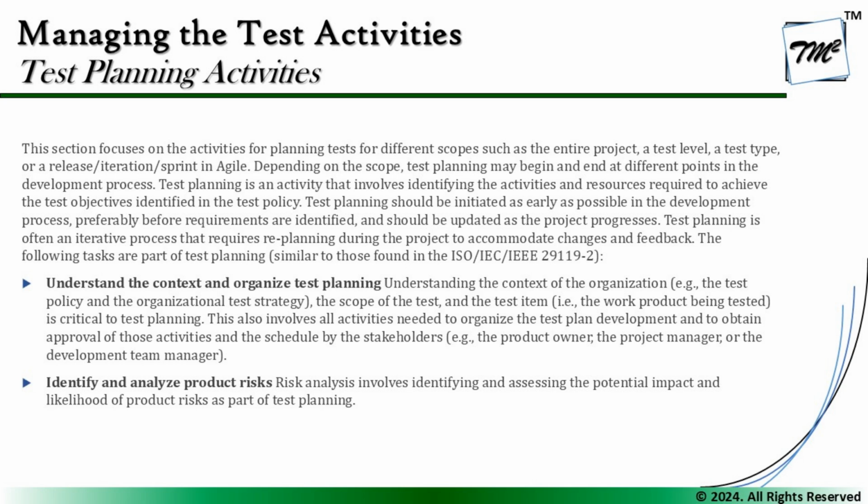That is, we do it once for release planning and once for iteration, which is basically the sprint. So yes, the activities might be repeated for the release in the beginning, and the same activities can be performed, or some different activities can also be performed. For example, estimating the testing task does not happen during the release plan, but happens during the sprint planning. But determining the product risk, project risk can happen at the release plan and also at the sprint level, which you're targeting, that how will you be mitigating it, right?